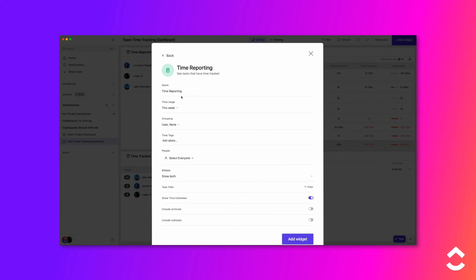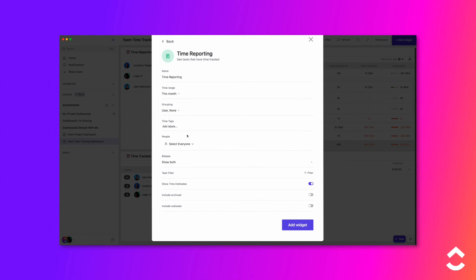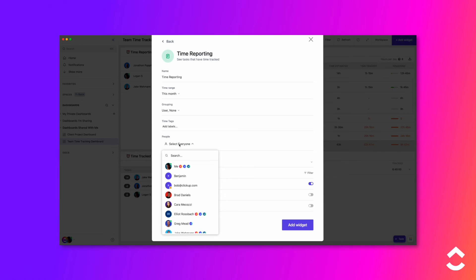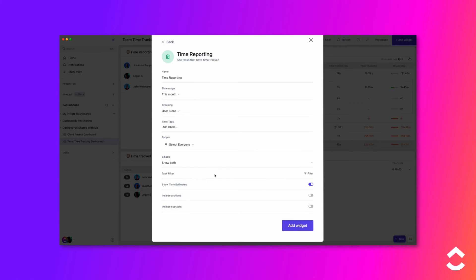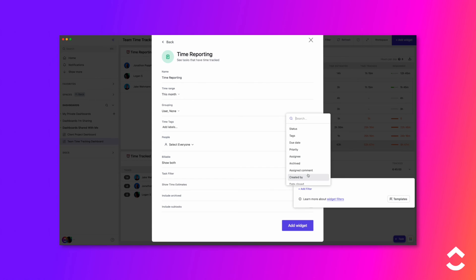Set the time range — choose how much time you want to be included, such as this year, month, week, or a custom timeframe. Select people whose time you want to be included in the report. Choose whether you want to display billable, non-billable, or both. Toggle archived tasks to be included or excluded. Toggle on to show how much time was estimated. You can also add additional filters to further adjust the scope of your widget.